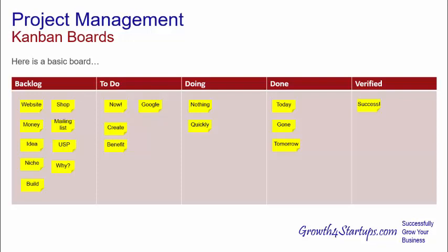For most of us working here in a startup environment, that's not actually the most useful approach. We'll want to do a customer check on each service or each major increment that we have managed to complete. And so having a verify column is also very useful. And clearly then, we want to make sure that there can only be so many tasks in the done column before we decide, okay, good, we have enough and now they need to be verified.